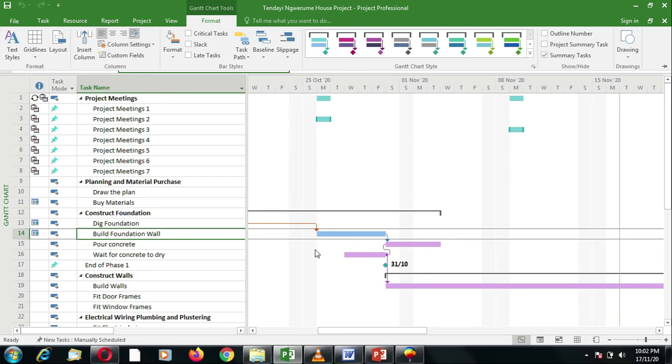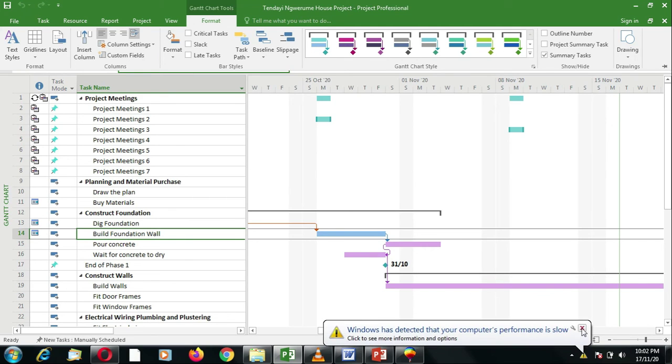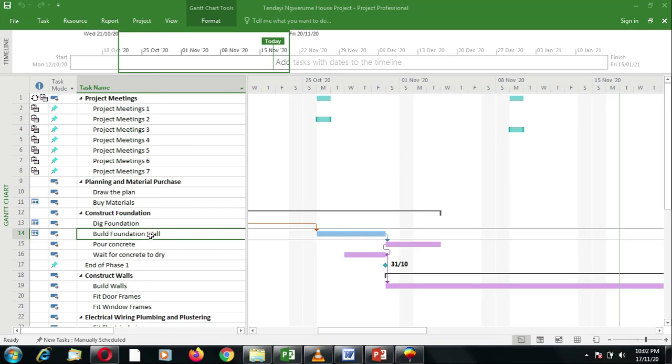It also helps us to highlight the tasks that come after this particular task, which are driven by this task. In other words, it says which tasks that are coming later are affected by the scheduling of this particular item. So those are the ones that are called the driven successor tasks.